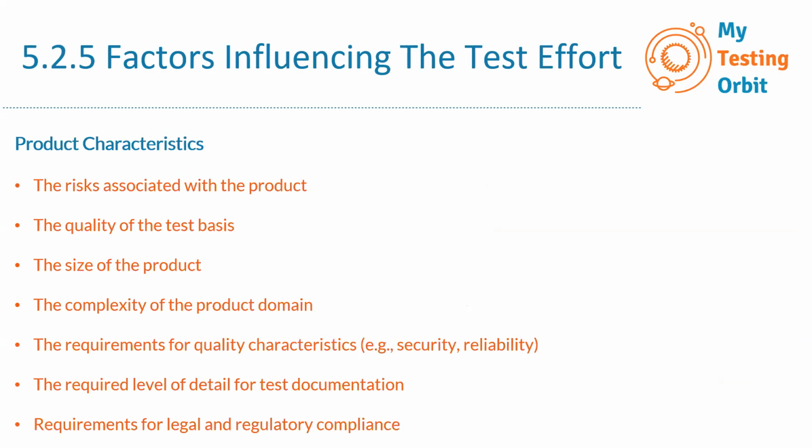Test estimation is a difficult thing to do, because one common mistake is that we only take account of the effort required for test execution. But this is not correct, because test estimates must also include the time we take to carry out all the testing related activities.